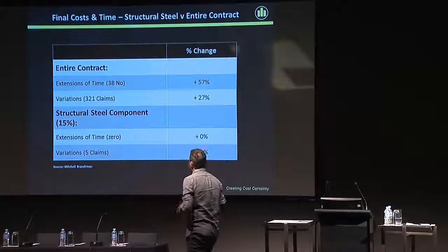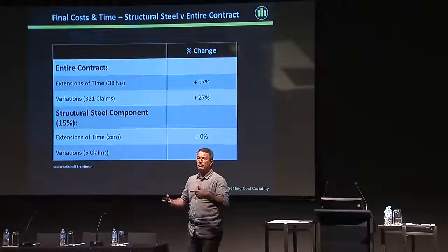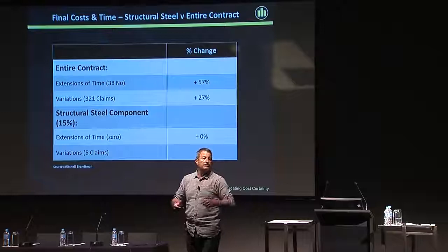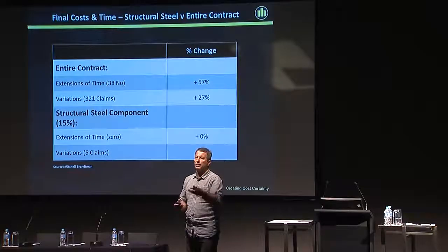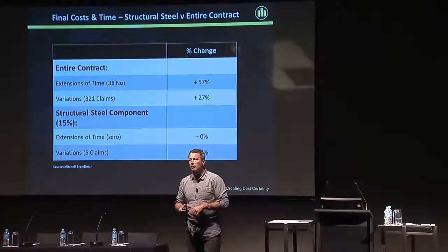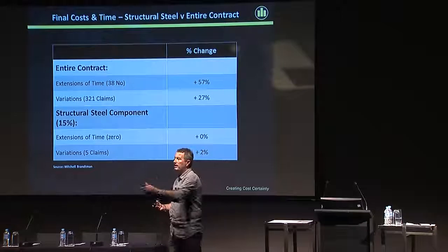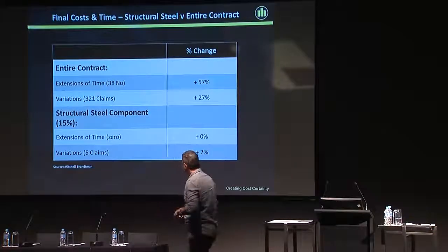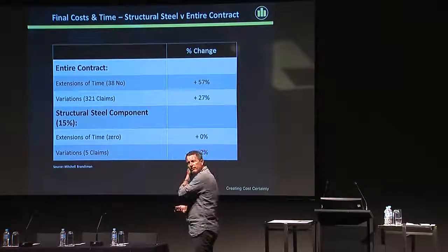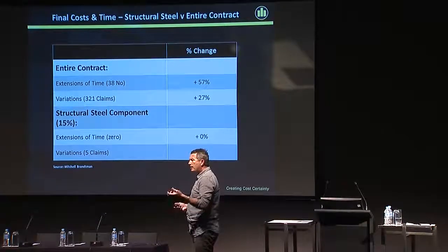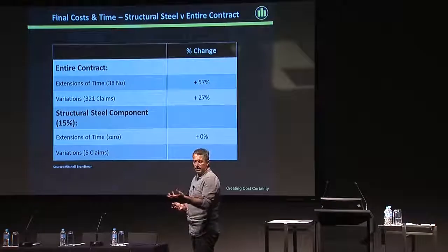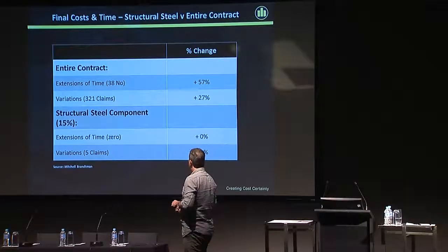So what I learned out of that is when we're modeling, what we are trying to do is create efficient construction. We're trying to create certainty for a subcontractor that when he turns up on Thursday, that work is going to be ready for him to do. He won't be turned away and not paid for that time when he's not there. And this is a challenging thing for designers because it's not really what they're about. The other thing I learned is that you get the right people to be looking at this type of information.